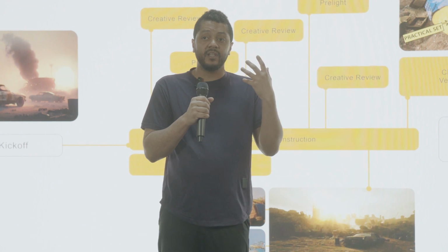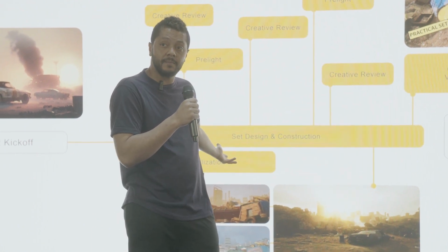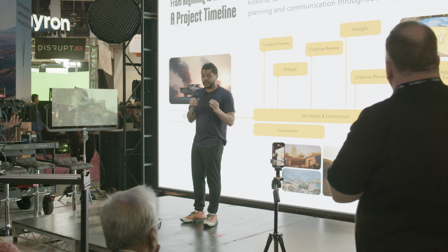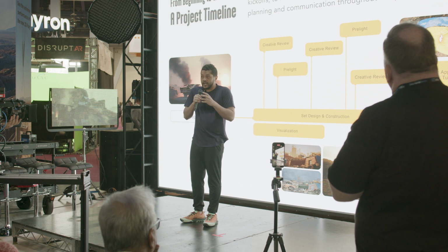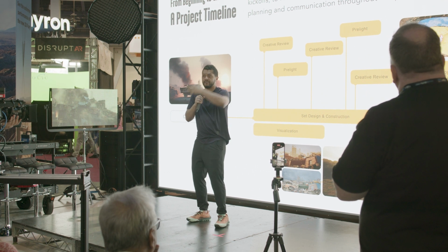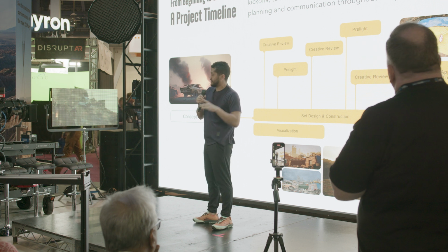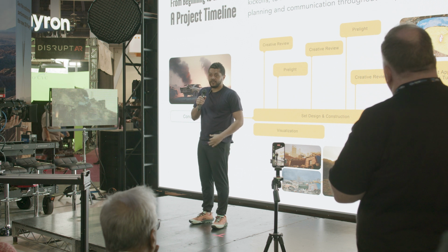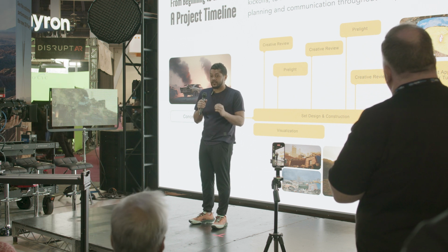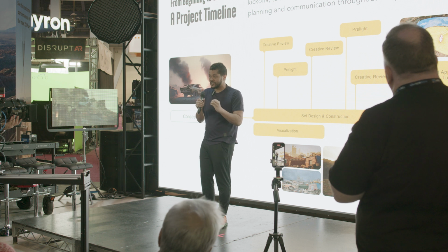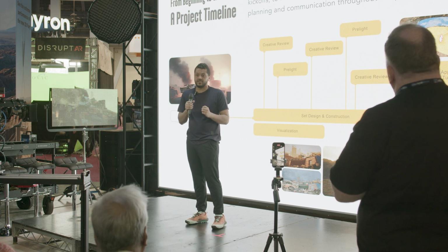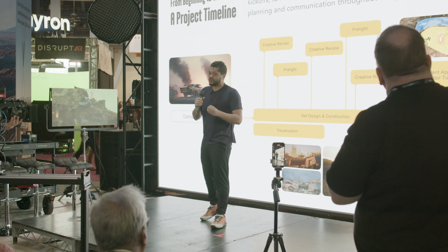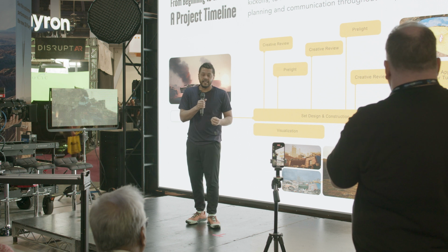All of a sudden, it has the visualization, which is the brain of the director, the set design, which is the brain of the production designer, and if you have a cinematographer, the DP, you are narrowing down your scope. Instead of making everything, the DP is going to tell you, no, this is the area I love. I want it to be dark over here. I want it to be out of focus over here. Those are the kind of decisions that get you to having 40% cost savings. Those are the decisions, right? So this stage, right in between here, in my opinion, is the most critical stage to saving money. And that's why I wanted to point it out.